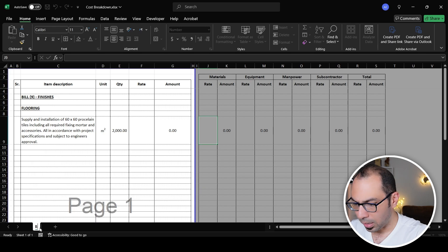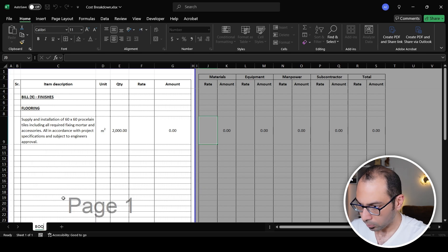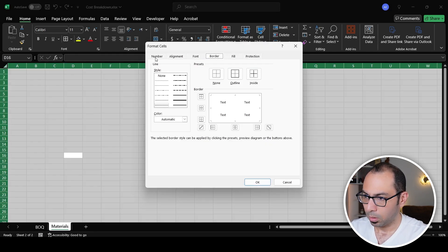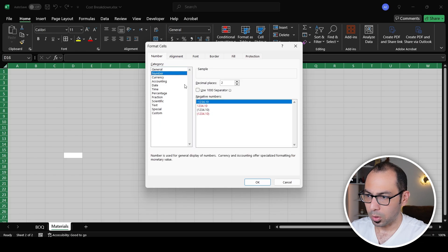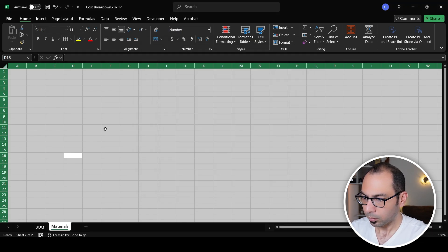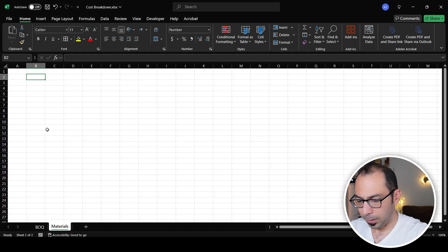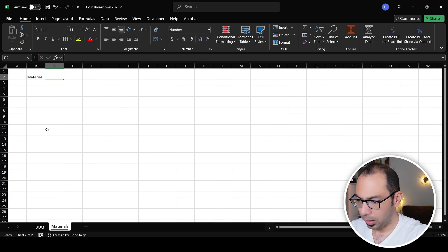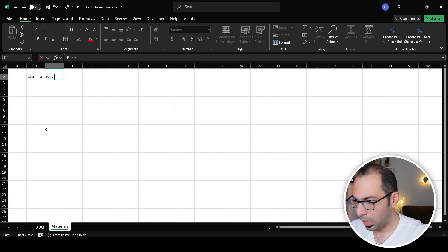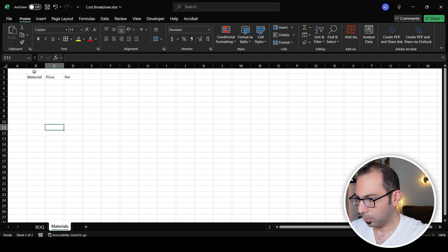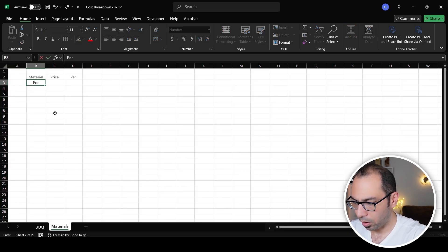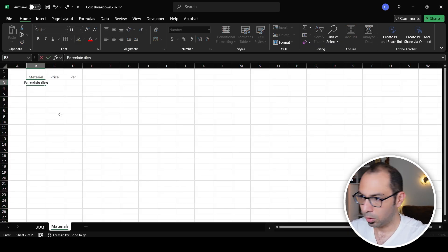I'll call this tab 'BOQ.' The next step is materials, so I'll create a new tab called 'Materials' and make a material list here. I'll label the columns: material, price of the material, and the unit — per what. In this case, what materials do we need? We need to supply the porcelain tiles — that's a material.